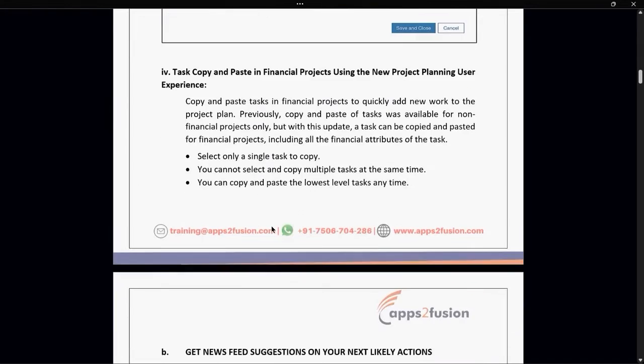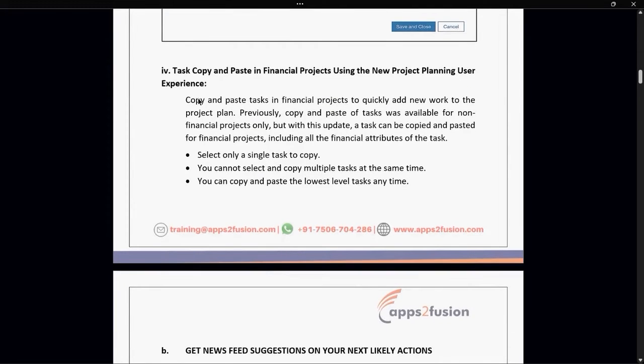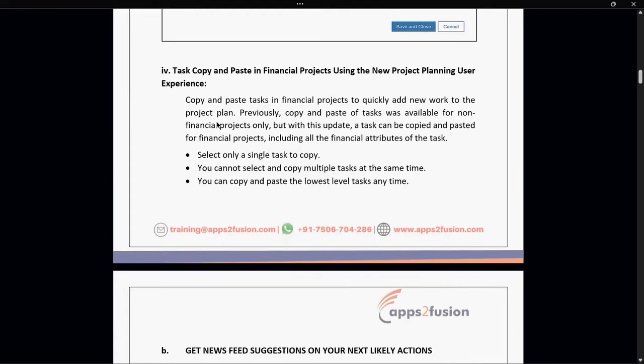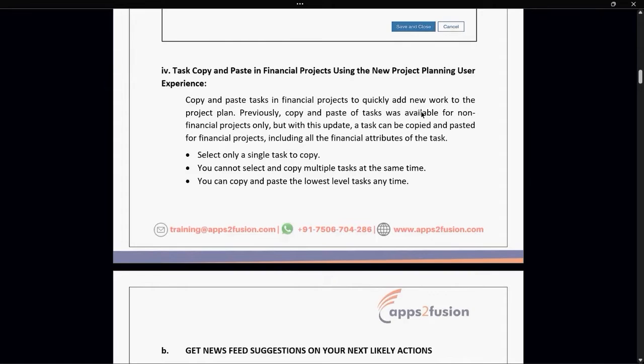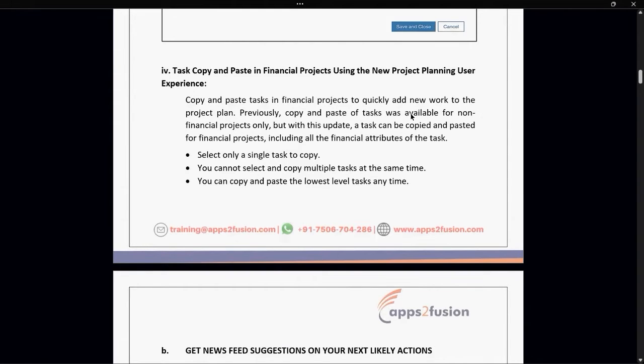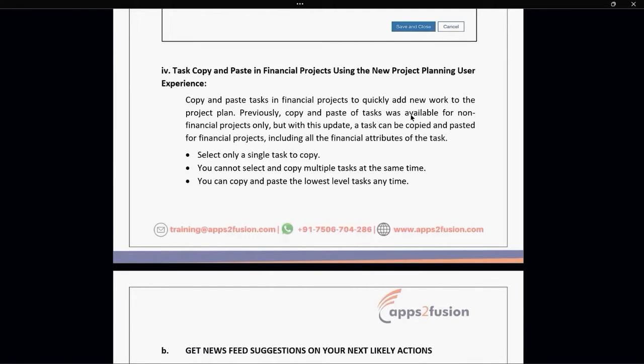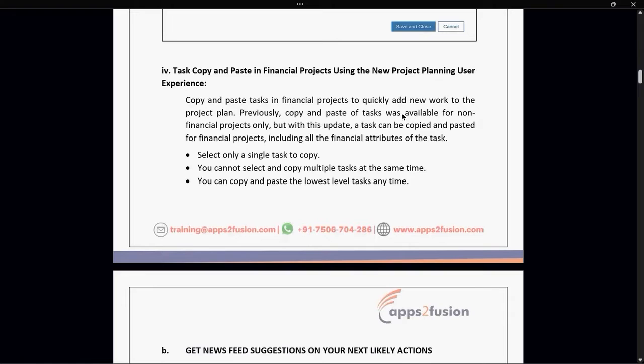The next part is task copy and paste in financial projects using the new project planning user experience. In this update, we can copy and paste the task in the financial project to quickly add new work to the project plan. Previously, we could not copy and paste tasks. Copy and paste was only available for non-financial projects. But now this has been updated for financial projects also.